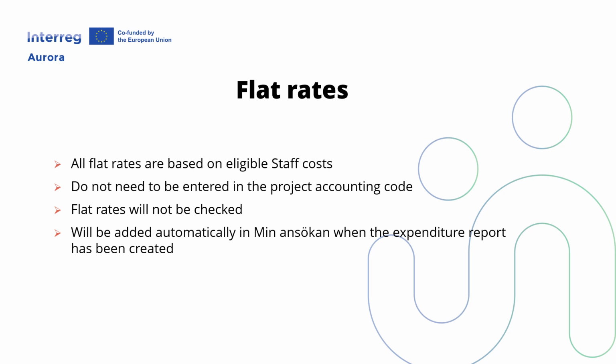Additionally, there is no need for the flat rates to be entered in separate records or on a separate project code, and they should not be reported under any other cost category. Controllers will not request any verification for the costs covered by the flat rate, and they will not be checked. Flat rates will be added automatically in Min ansökan when staff costs are reported in the expenditure report.